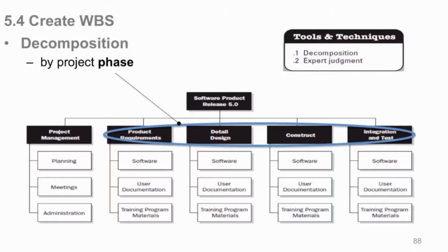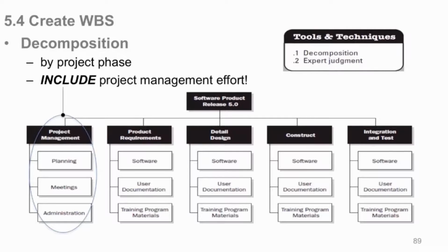So by phase. I mentioned this earlier, but here's where it really applies. Whatever breakdown structure you use, you absolutely must not forget to include your own project management work, because you will be doing planning work. All this planning stuff. You're spending time, money, and people. You're doing it, so it's got to be in there. It's got to be accountable, because you're costing money. It's coming out of your project budget. Even though it's incidental to the actual deliverable, you've got to account for it.